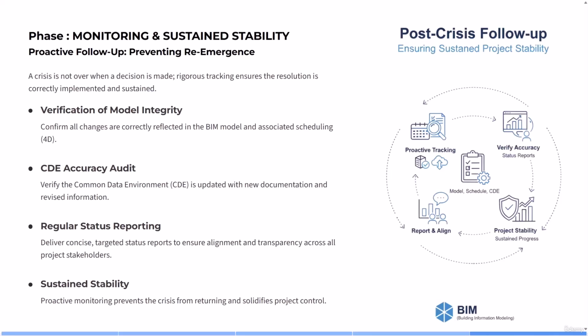For example, suppose the facade materials for the project are not available. The client says that the material must be changed. The architect is concerned about the form and quality, and the contractor looks for the fastest and cheapest option. The structural team emphasizes that the weight and material of the structure must not change significantly. Without proper management, the project may be delayed. Here is what the BIM manager should do.